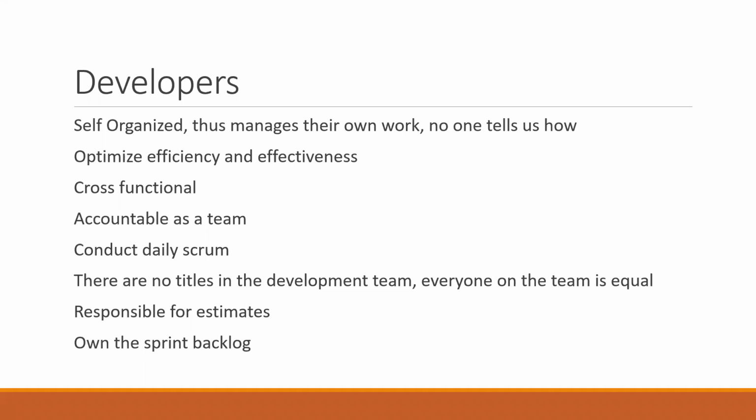How many stories are they effectively working on at the same time? You have to limit that. It's not only limited in Kanban, but you can actively limit that on a Scrum board as well. Then when you go to your burn down chart, as Vicky was trying to explain, the burn down chart can tell you a lot of information about your team, where they are stuck, where they are not working, where they are not closing stories, and a lot of information.